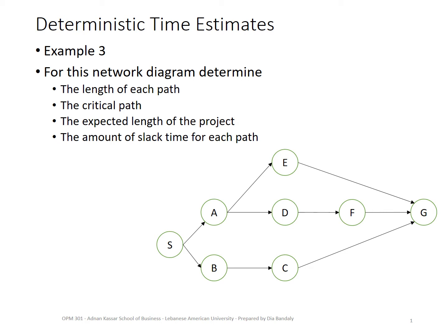So we have a virtual starting node, so I will always start here, and I have one ending node, so I will always end up here. Now, it's very important not to miss any path, otherwise your analysis will not be complete and maybe sometimes completely different. It's better to scan your project in a systematic manner. Either go from top to bottom or bottom to top. Don't go randomly because you may miss some path. So I will go from top to bottom.